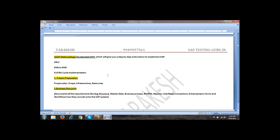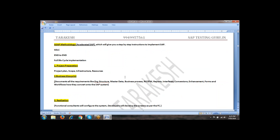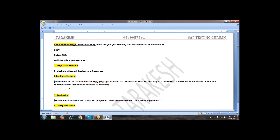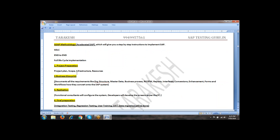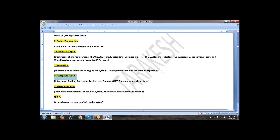What is SAP methodology? There are five phases in SAP methodology. What are those five phases? First one is project preparation, second one is business blueprint, third one is realization, fourth one is final preparation, fifth one is go live and support. These are the five phases — we will call it ASAP methodology.